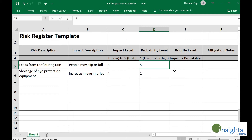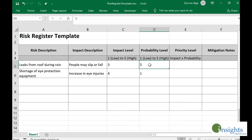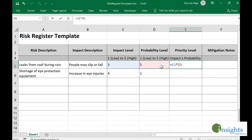The components are: impact level, going from one meaning low to five which is high. The higher the number you assign for impact level, the higher the impact is to the organization. On the other hand, probability level — the higher the number you assign, the higher the chances are that that risk will happen. So, to identify the priority level of a certain risk, we multiply the impact level and the probability level. Some organizations also add another component — the severity level — but the idea is the higher the number, the higher the risk number we will get.